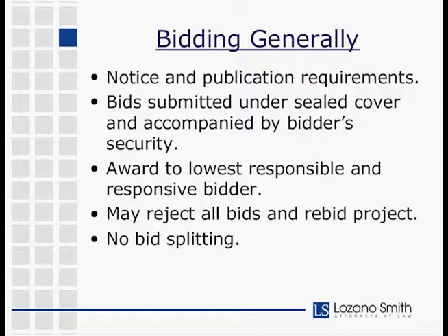And I do see that there's a question about bid bonds and whether bid bonds are required for non-construction bids, such as janitorial supplies. If you look at 20111B, that's the section that applies to construction bidding, and it specifically requires a bid security to be submitted with construction bids, or excuse me, public project bids, which is generally construction.